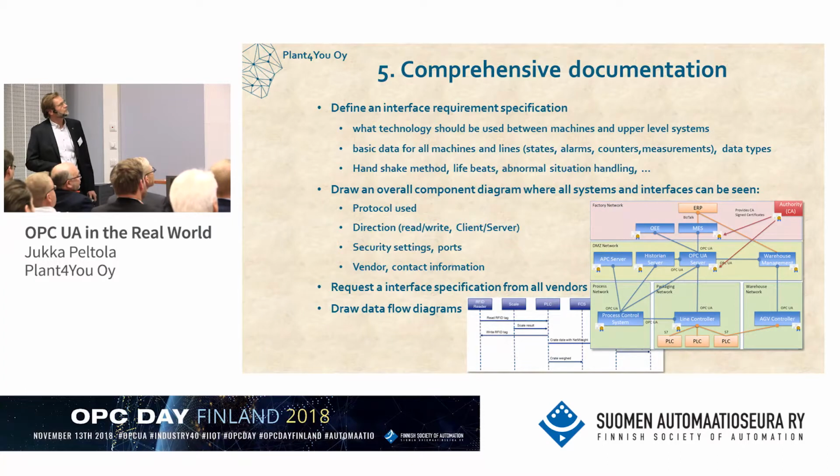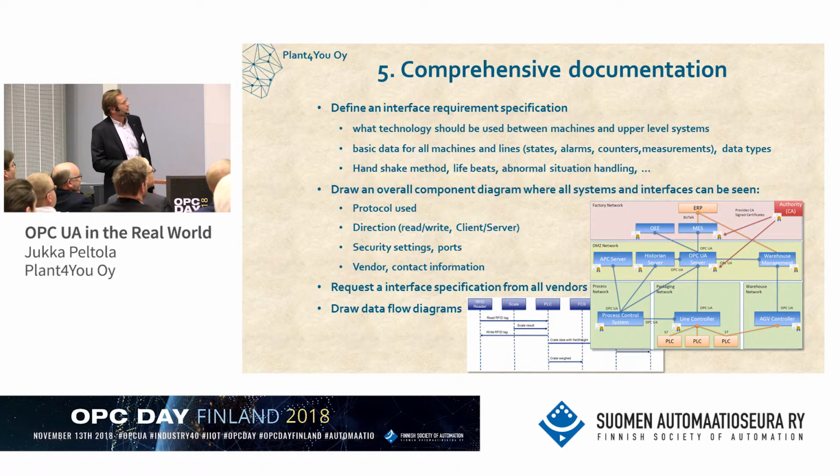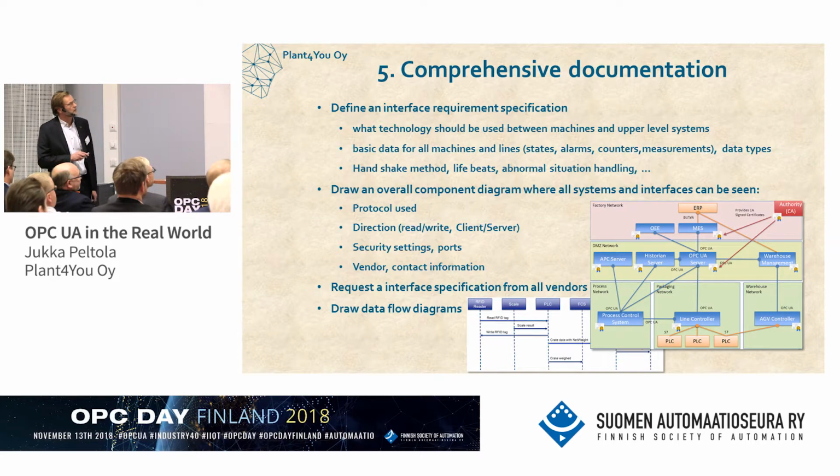And do comprehensive documentation. Really do some kind of component diagrams where each interface is written, and also define which protocol is used, what the direction is, read, write, client server, pub/sub, or methods, security settings, ports, vendor contact information, and so on.